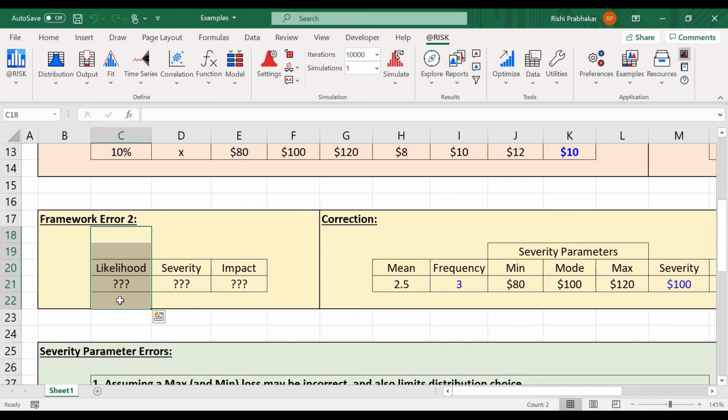Great. The vast majority of events that I've seen in people's risk registers, again, over the last 15 years of looking at them, are things that can occur more than once. Accidents, flood events, wet weather, machine downtime. What's the probability of downtime in one of the crushers in this mine over this year?